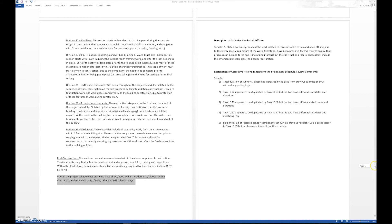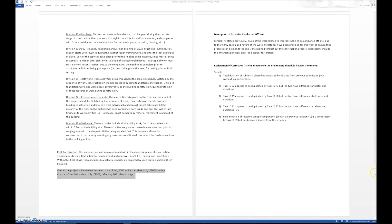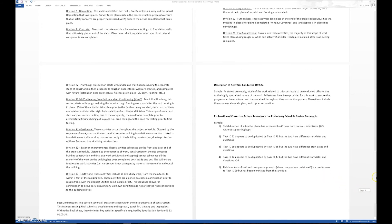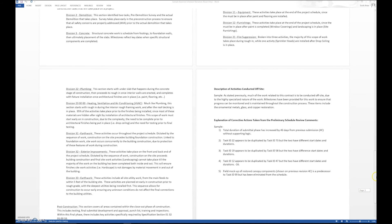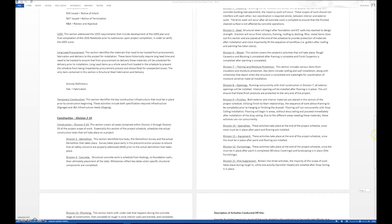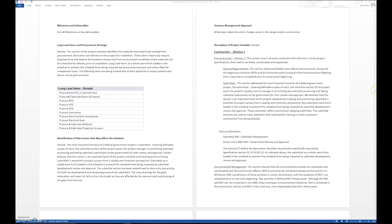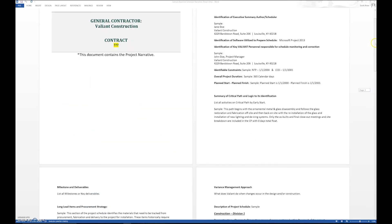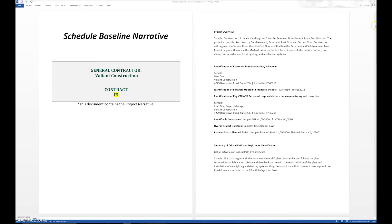So this establishes a narrative that goes over the scope of work that is going to take place so that somebody who's reviewing the schedule can read the narrative and understand what the schedule is all about briefly. You can see this eight-page document covers the entire schedule that may be 40 pages long.